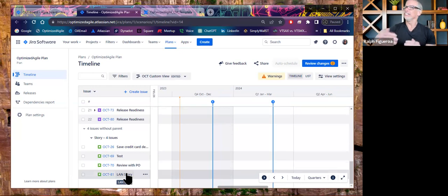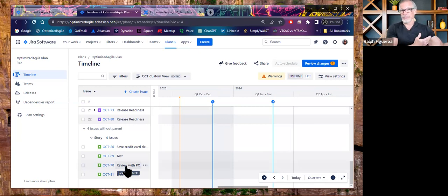And in some of the organizations that I work with, they have matured enough along the ways that they want to see any story mapped to an epic. Why? Because they want to be able to track that story belongs to this feature, and then by bumping it to the feature, they can track the progress and the percentile complete. And I will show an example of that here shortly. Now you can do that in Jira natively, right?